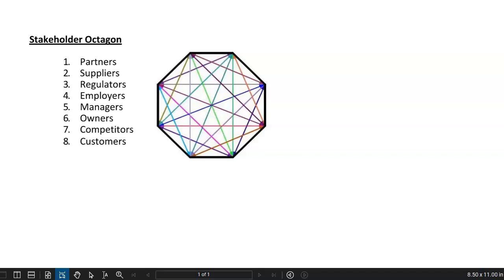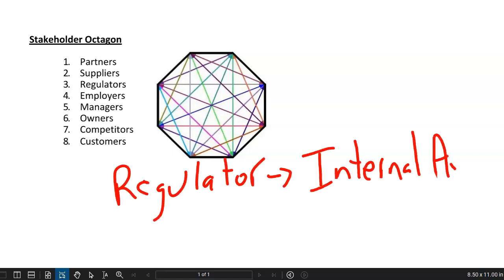When I send out one of these generic stakeholder models, my directions are usually to take a look at the generic list and then identify or assign specific names of people, groups of people, or systems that are associated with each of the generic names. Sometimes it's a one-to-one match, like for a stakeholder such as regulators.